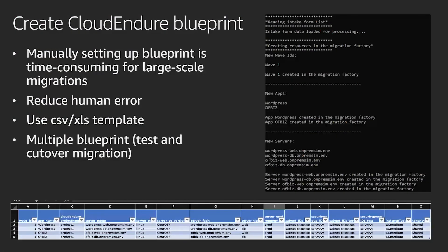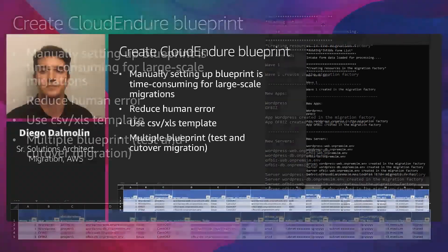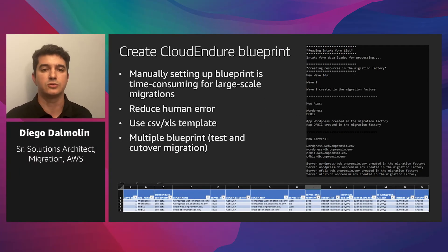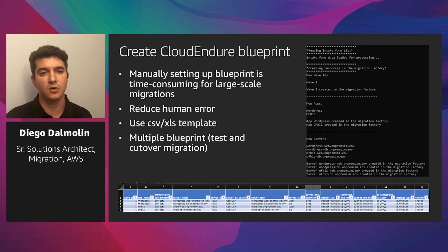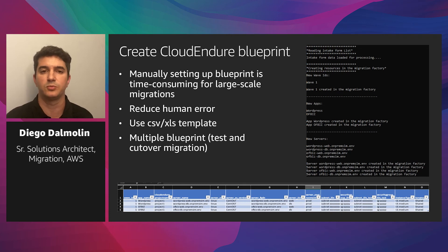A CloudEndure migration blueprint is the configuration parameter that defines how CloudEndure should launch the migrated EC2 instance. It is where you define the EC2 instance type and size, subnet, security group, and tenancy. Manually creating hundreds of blueprints could be time-consuming, but you can leverage a spreadsheet or CSV file to build your migration planning and use a script to import that configuration into CloudEndure as blueprints. A migration factory solution should also have information about the migration wave and the applications that run on all the servers.